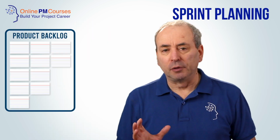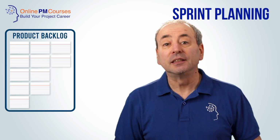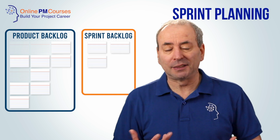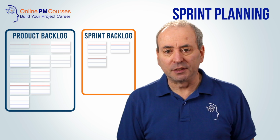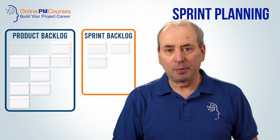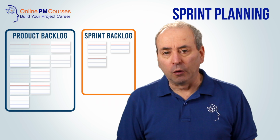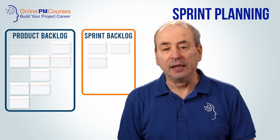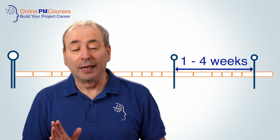At the start of each sprint, we draw down from our main backlog enough activities to fill up the sprint to meet the capacity of the team during the sprint. And the capacity of the team is, of course, the product of each team member's individual capacity by the number of team members that we've got. The longer the sprint, the more we can achieve in that sprint. Sprints tend to last for anything from 1 to 4 weeks, with 2 as a common and typical number.